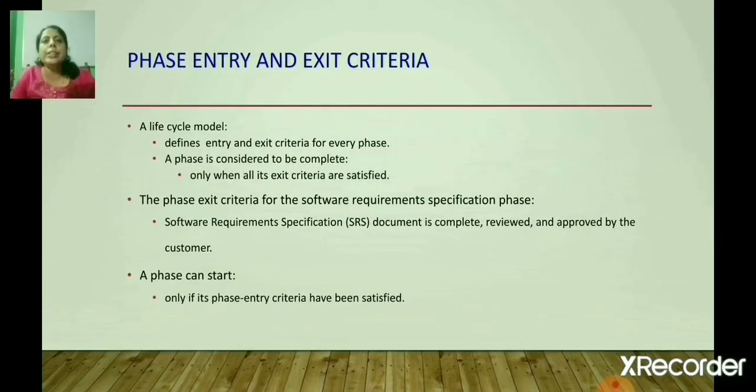Then phase entry and exit criteria. It is one of the most important features of a lifecycle model. A lifecycle model defines entry and exit criteria for every phase. A phase is considered to be complete only when all the exit criteria are satisfied. Means when the exit criteria are satisfied, then it goes to the next stage.